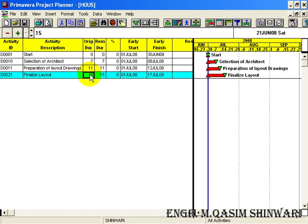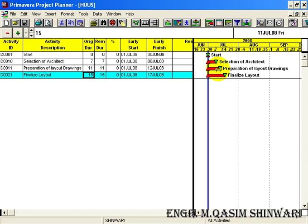In this way we can add the original duration. One can observe easily that more the number of days, more will be the length of this bar.